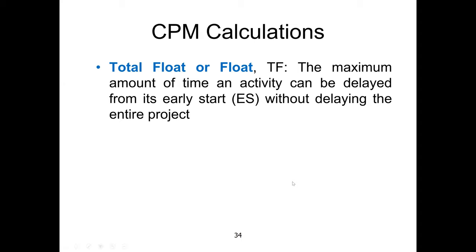Total float, or float, we have discussed before. Some people call it total float, some just call it float. When we just say float, it means total float. It's the maximum amount of time an activity can be delayed from its early start without delaying the entire project. Total float is late start minus early start, or late finish minus early finish. Both give the same result.